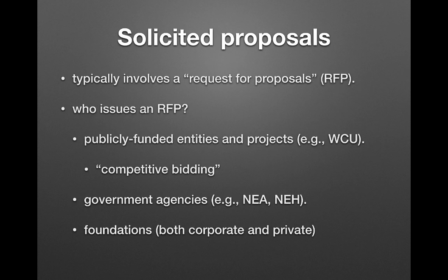So they issue this RFP, and then different suppliers will respond to the RFP with a proposal, or what's sometimes called a bid. Oftentimes these are sealed bids. They send them in to the budget office here on campus. And then there's a public meeting that's held, because we want to make this as transparent as possible. The bids are unsealed during that public meeting.